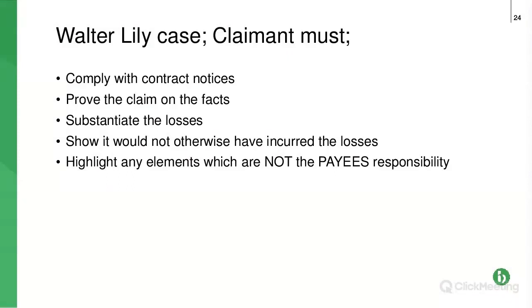Now, bear in mind, it is far easier if you've submitted proper notices, because you're not then having to argue this case and find that information to show that effectively the employer did know what was going on. They did know that there was delay and that there was going to be a claim. It's just that the proper formal written notice hasn't been sent. But if you need to argue this in meetings, that's the case that you need to be talking about.